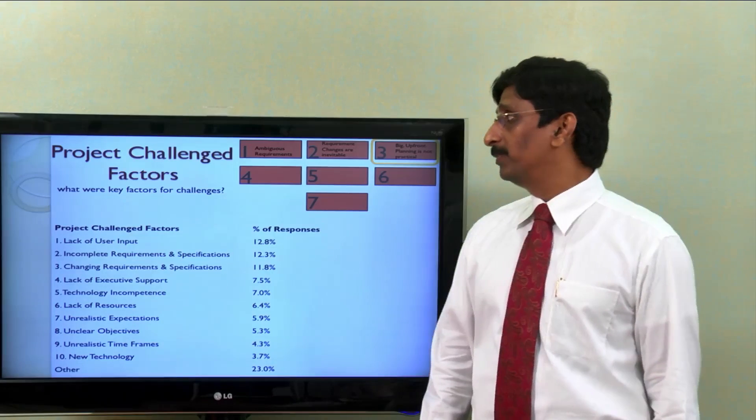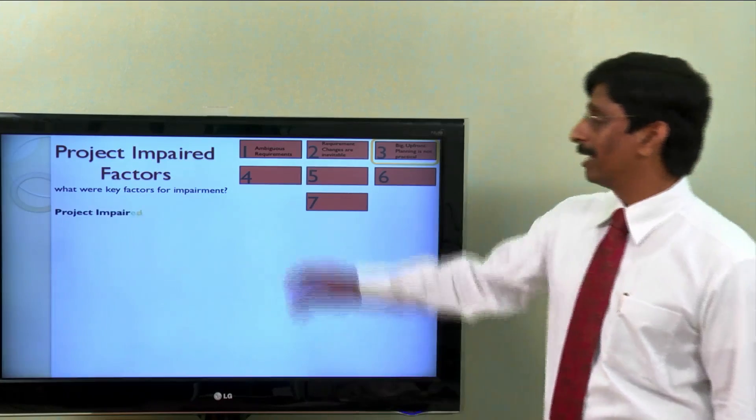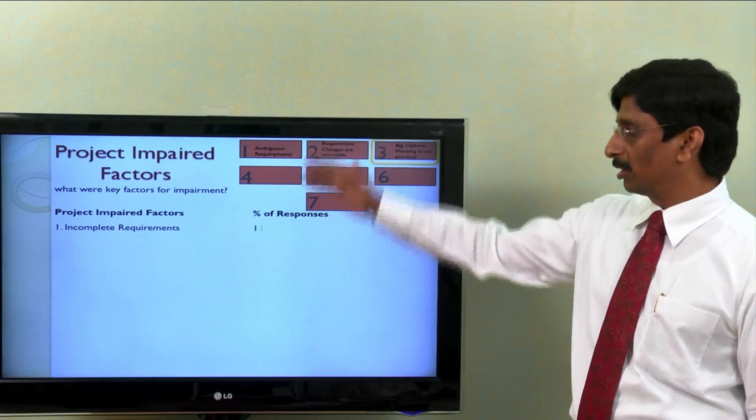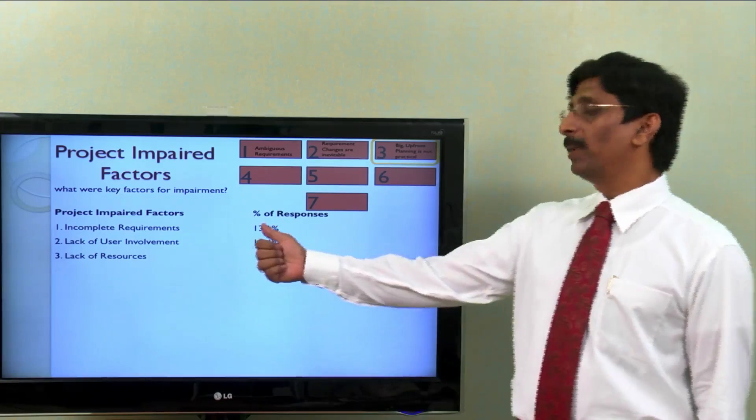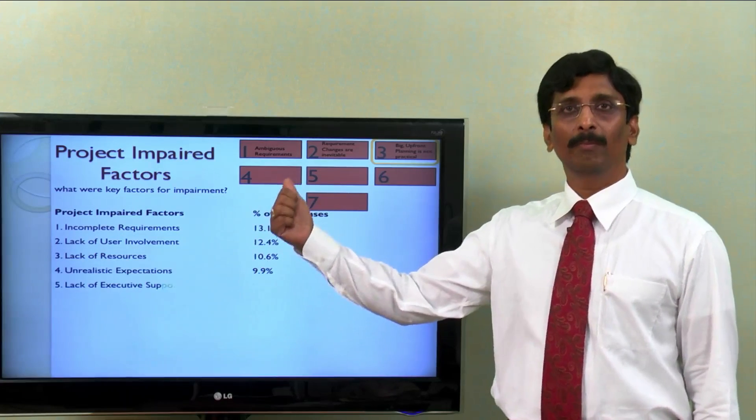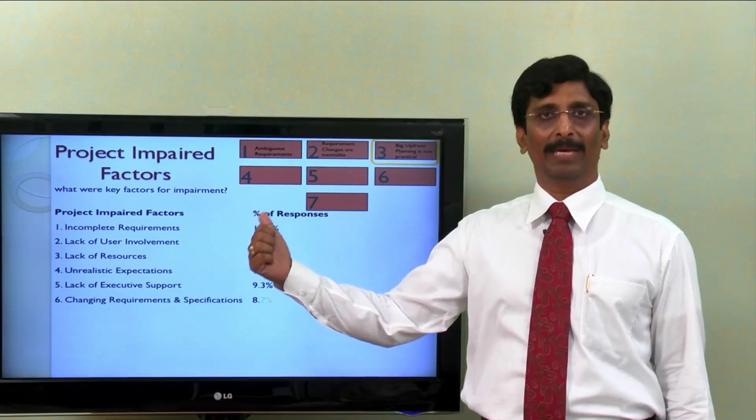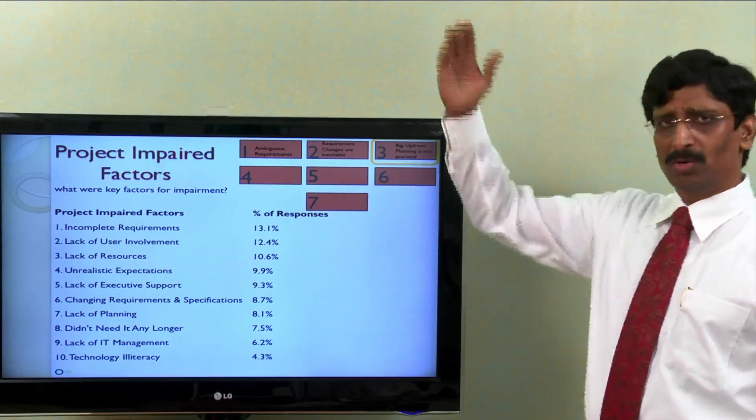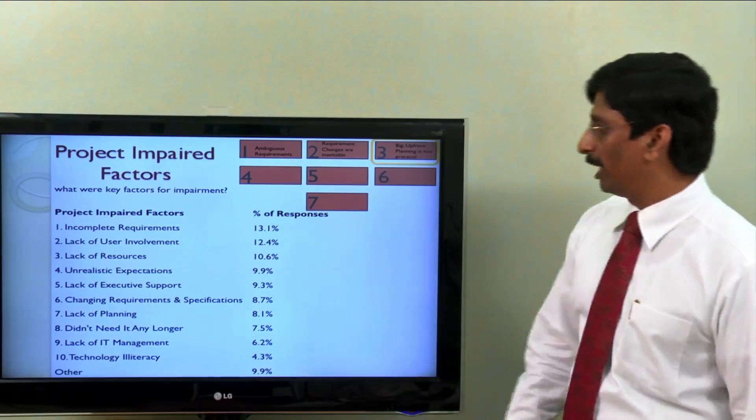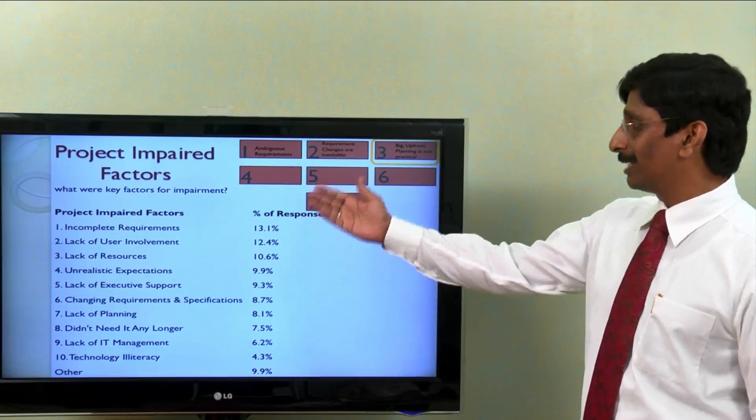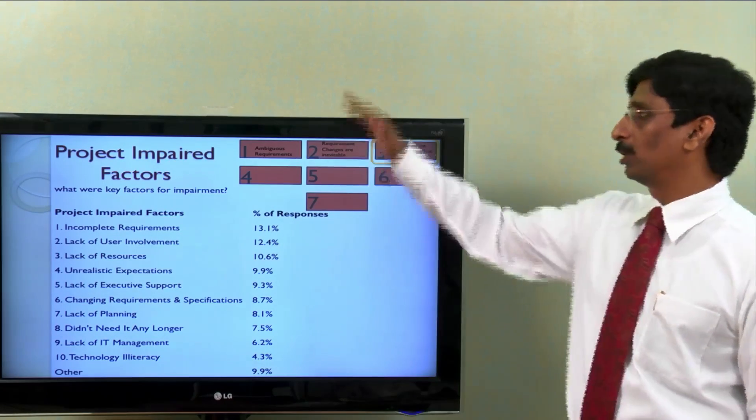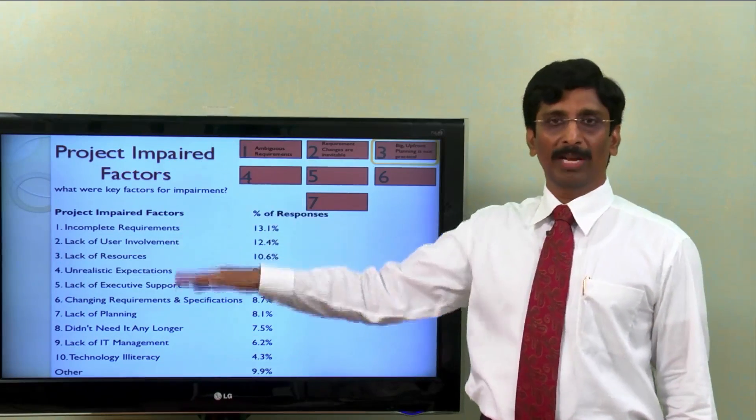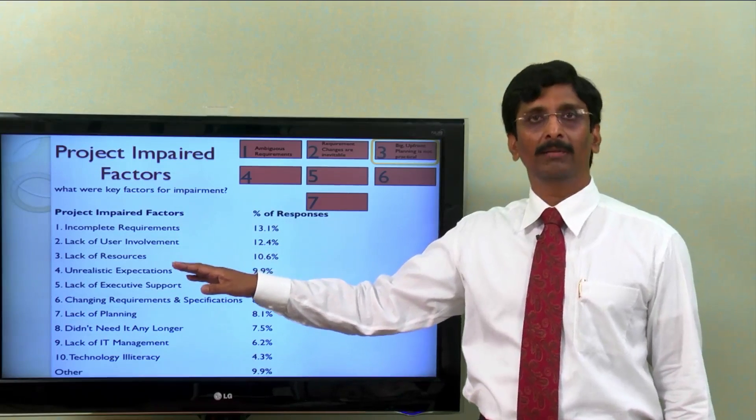They also came up with reasons for impaired projects. Here are the reasons: incomplete requirements - that is the major reason for projects to be cancelled. Lack of user involvement comes throughout in the top two or three. Lack of resources, unrealistic expectations, and all those. I'm sure many of these factors do happen in your projects, at least some of the projects.